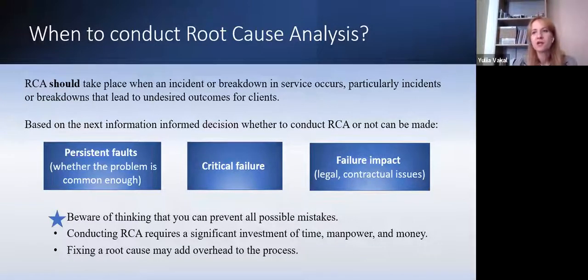If you don't have it, you need to see in which industry or which kind of product you're doing. Because if you're doing outsource, you can have different products, right? If it's something healthcare related, something critical, critical mission systems, you should go for more formal techniques. If it shouldn't lead to critical failures or big failure impacts, you could start with lightweight techniques. I would suggest starting with a lightweight technique, just to see if it does the job or not.